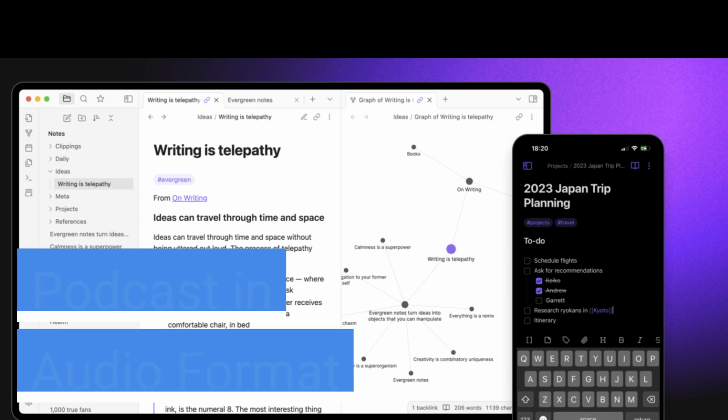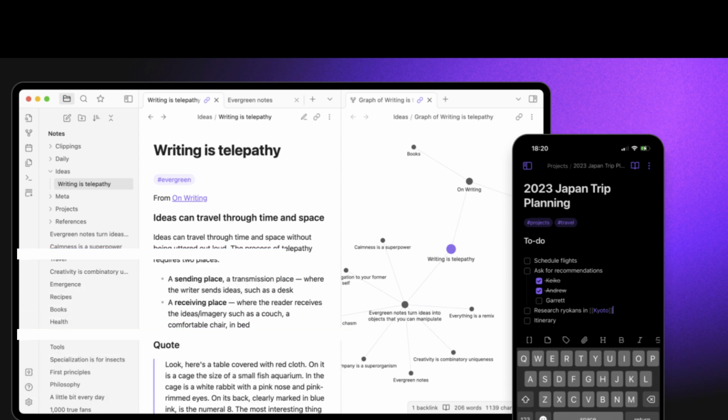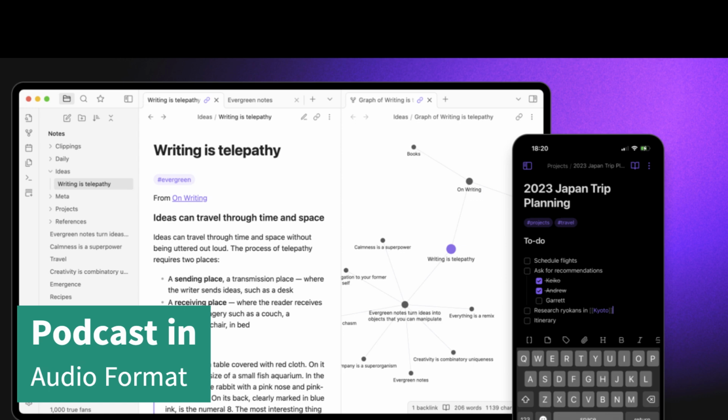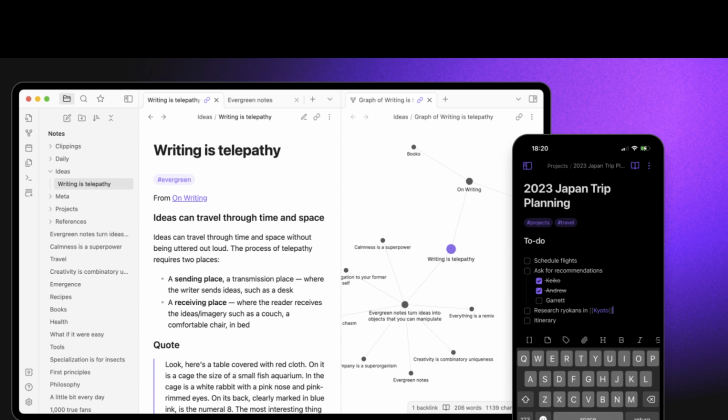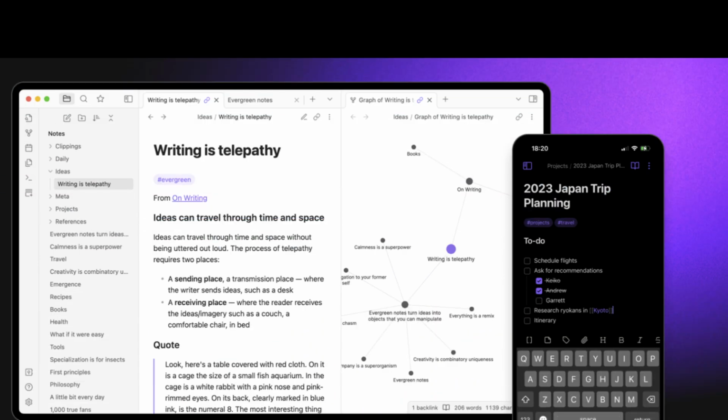But we're not just talking about folders, are we? We are not. It's the notes themselves that really make Obsidian shine. Each task gets its own dedicated note. This is where things get interesting. You go beyond just listing the task name. You capture every detail like priority level, current status, detailed description, even links to related documents or other resources. Plus, you can link it to the specific sprint that it belongs to. Like a central hub for all information related to that task.